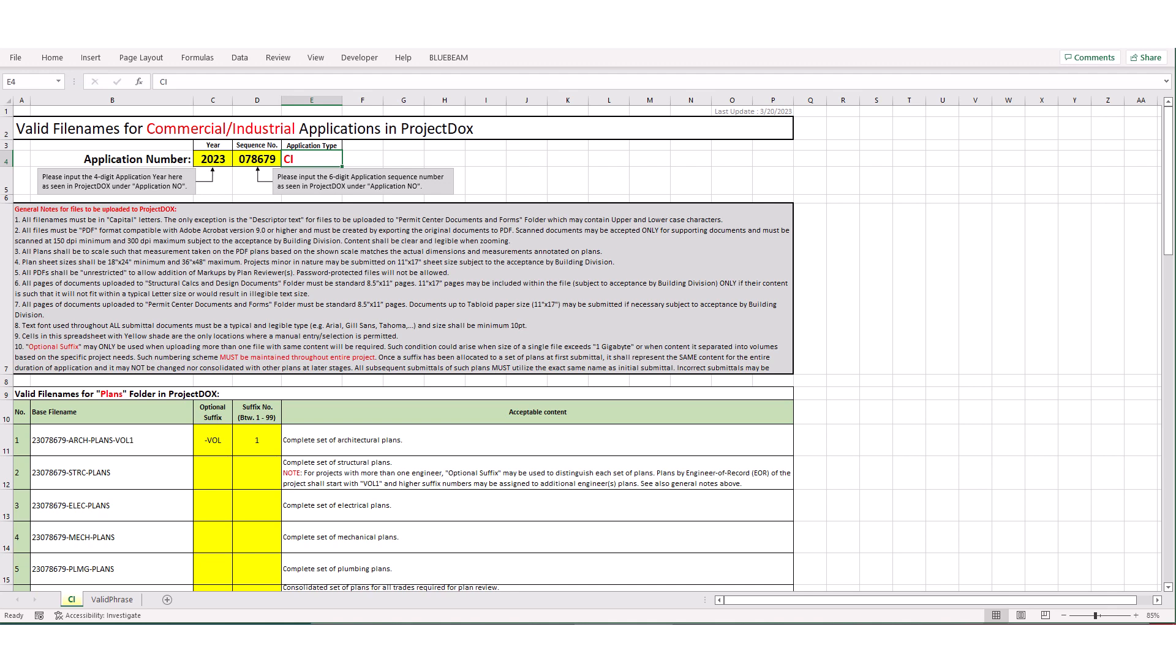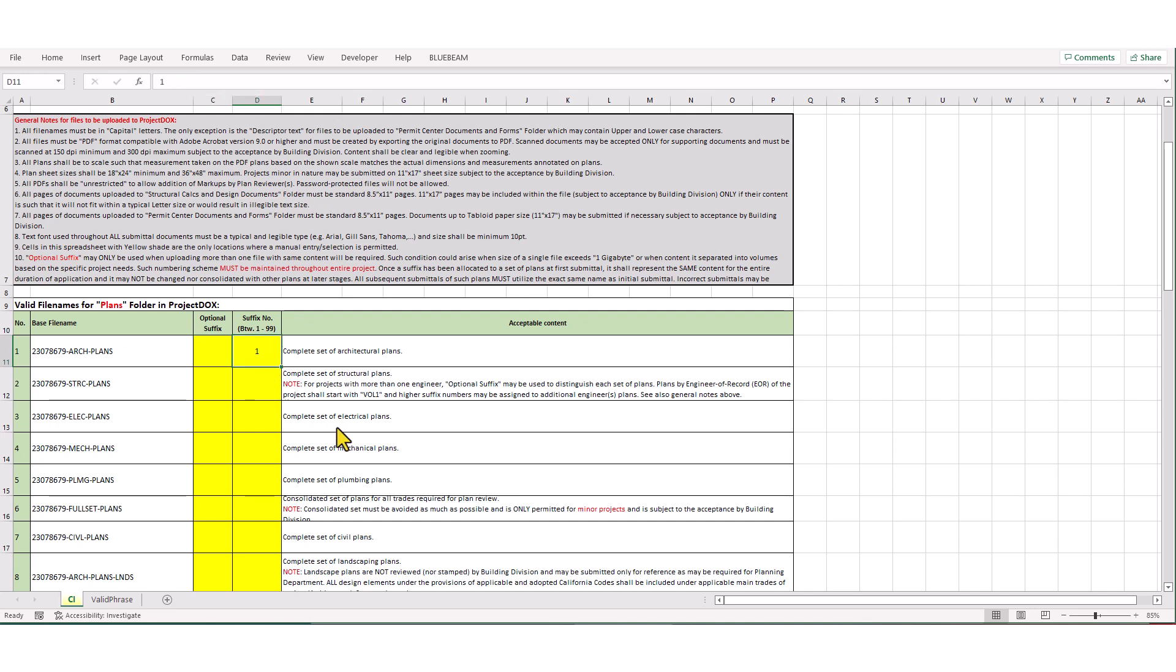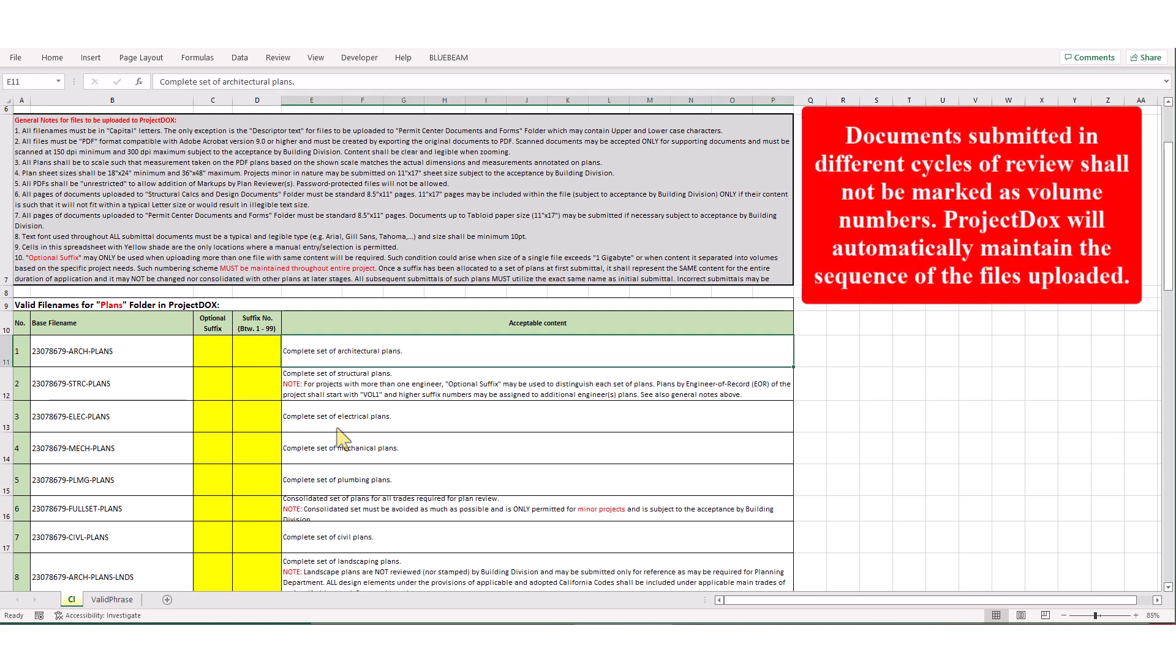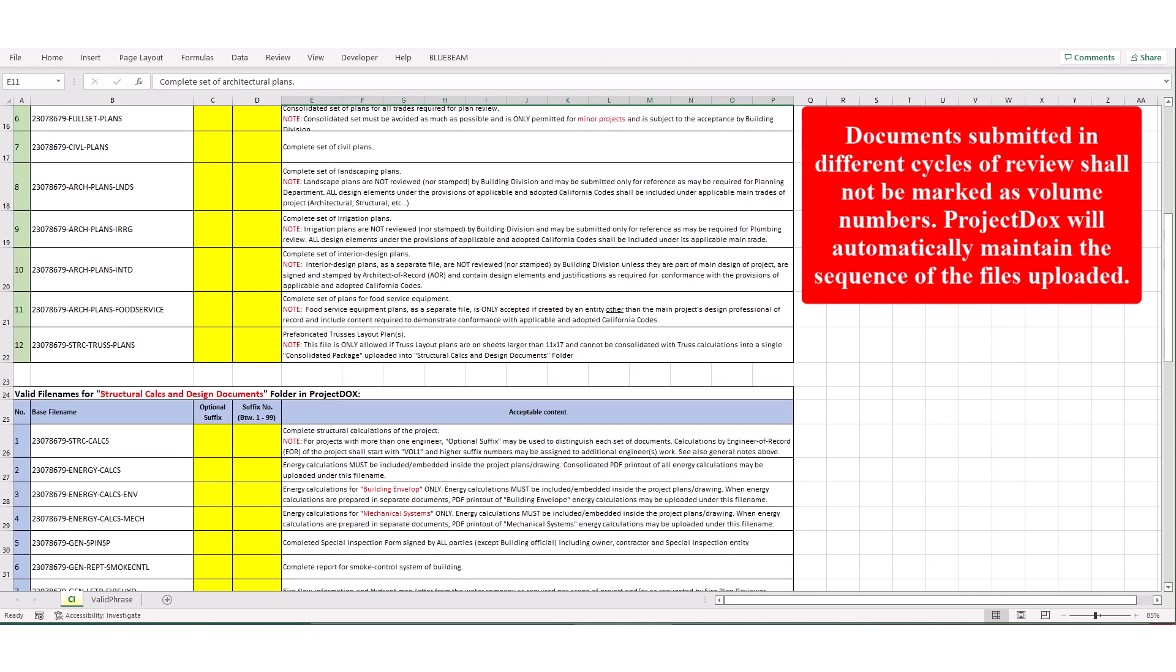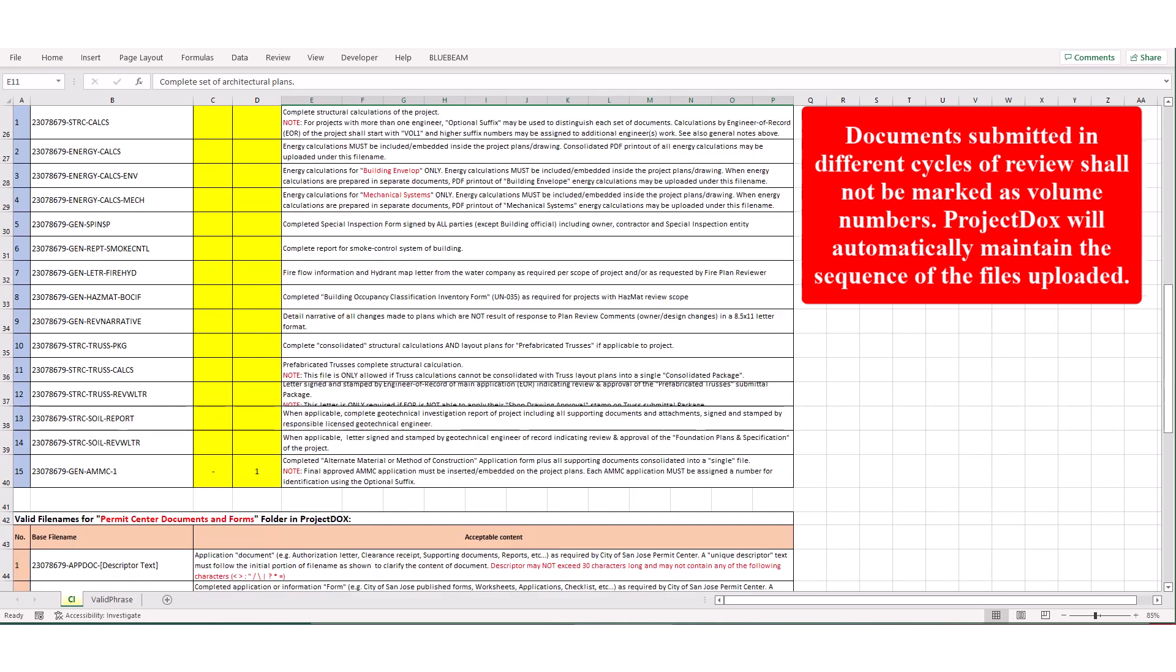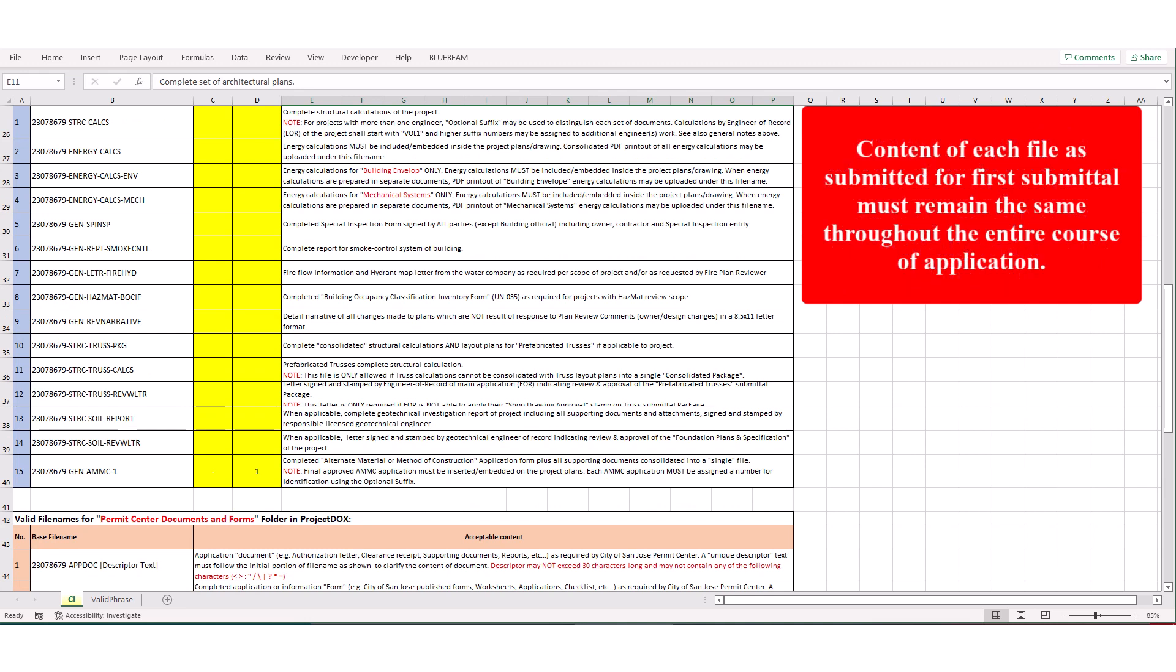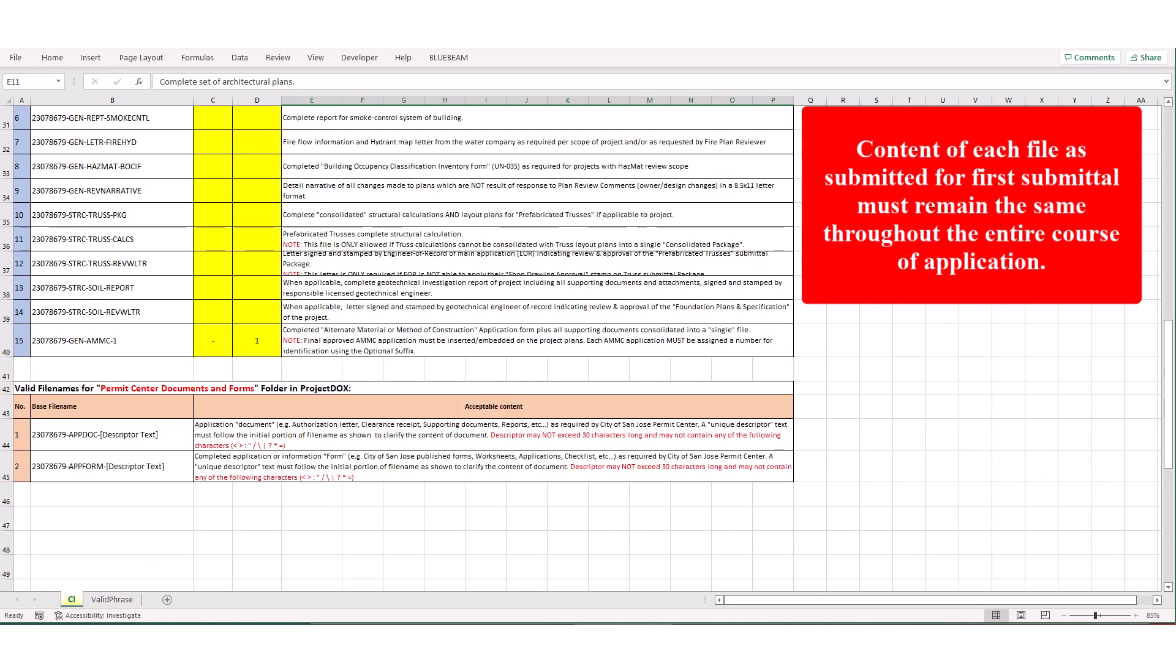For some types of applications, like commercial projects, some filenames may contain a suffix, only if file sizes are such that they exceed maximum capacity of upload or in cases where specific nature of project would require dividing the plans or calculations into a few separate volumes. Documents submitted in different cycles of review shall not be marked as volume numbers. Project Docs will automatically maintain the sequence of the files uploaded. Content of each file as submitted for first submittal, must remain the same throughout the entire course of application.